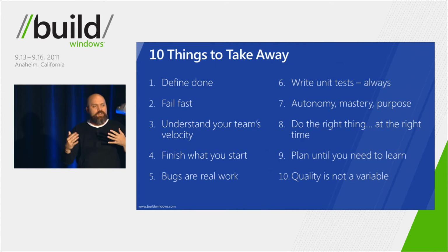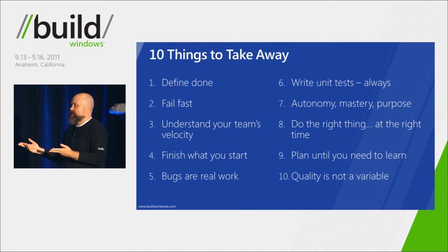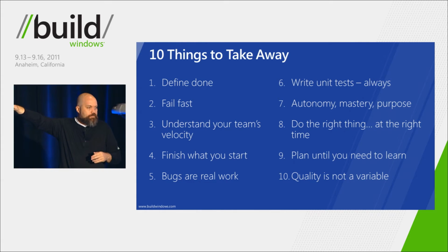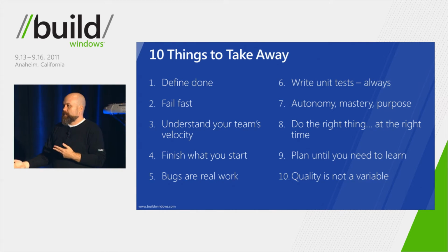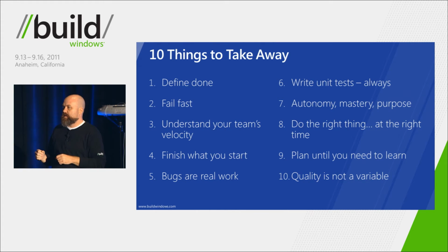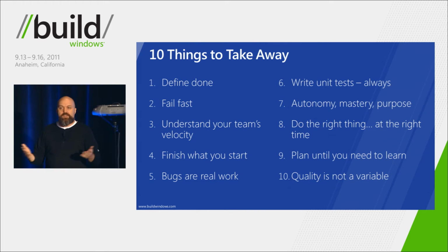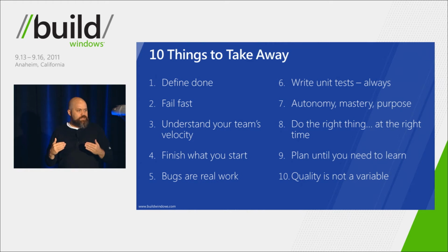But when we start to think about process, about tasks and stories and sprints, what's important is to fail early. It costs you less. And what does fail mean in this context? Well, it could mean that your burn down chart is ramping off crazy because you had some early discovery. Early on, you discovered that something isn't at all the way we thought it was going to be. It's going to cost us 10 times as much. Catch that as early as you possibly can and reset the sprint if need be. Reevaluate a story, retask that story. You always want to have all of those things happen as early as possible, where they will cost you less and where you have more time and more opportunity to mitigate them.